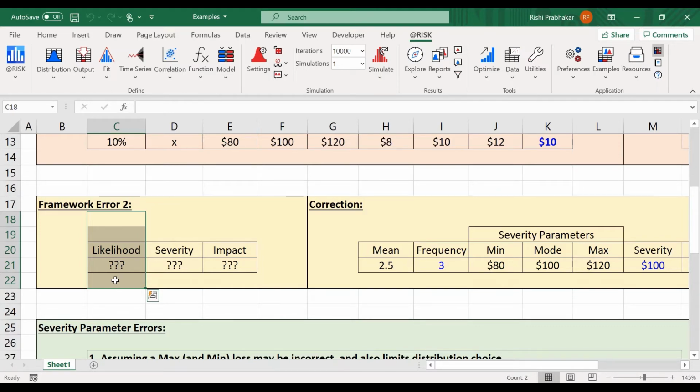The likelihood is the correct parameter to use if your event could only possibly occur once in the framework of your model. There might be, let's say, an access through private property line item, and you've currently budgeted that the farmer will allow you to use their roads to get to a remote site.